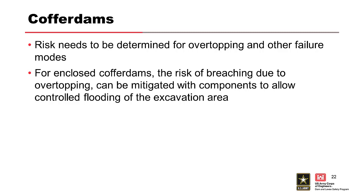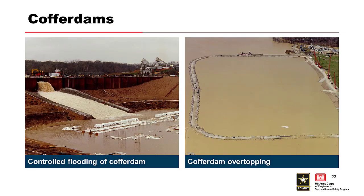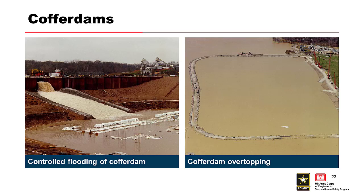Risk of cofferdam failure needs to consider overtopping as well as other potential failure modes like internal erosion. The next example is a cellular cofferdam in which the risk of breaching due to overtopping was mitigated. The cofferdam was flooded intentionally before being overtopped by two feet for two weeks. If the excavation had not been flooded prior to overtopping, the cellular cofferdam surely would have failed since there was about a 100-foot difference in elevation from the bottom of the excavation floor to the cofferdam crest. After the flood, only minor repair of erosion in the top of a few sheet pile cells was required, along with extensive cleanup of mud.